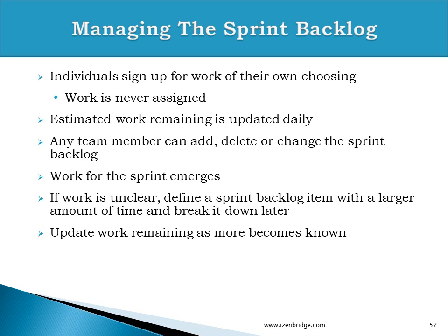Now, managing the sprint backlog, as we spoke about, individuals sign up for their work. Estimated work remaining is updated daily. In general, before the daily stand-up meeting, this should have been updated, and the Scrum Master should have plotted the sprint burn-down chart on the basis of this information. So what is a sprint burn-down chart? That we will see during monitoring, but at this point, we can take a guideline that the remaining work should be updated daily in the sprint backlog.